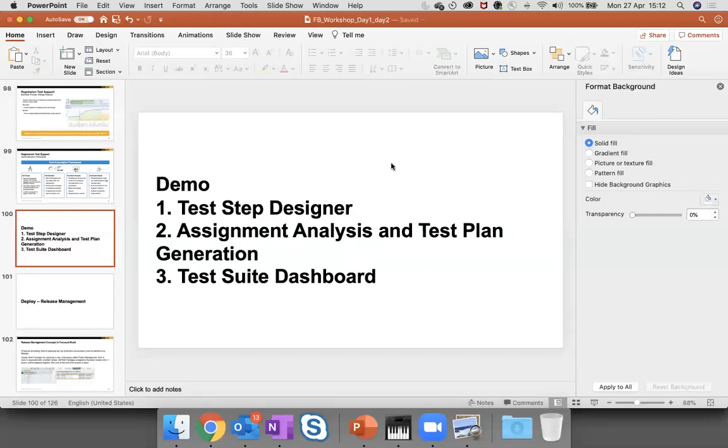Although that depends on how much you want to use Activate. The focus build templates also use Activate at a high level, as a phase level structure. But if you want the full work breakdown structure that is coming from the roadmap, then yes, you need to download the Activate template into C projects and then configure it as a build project or a master project.